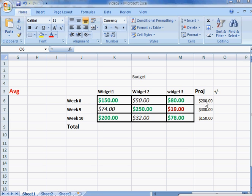We have our projected amounts up here. We're projecting that we should only have used $200 for Week 8, $400 for Week 9, and $150 for Week 10 for each of these individual widgets as far as how much it costs us.